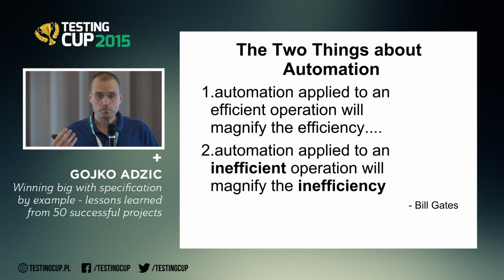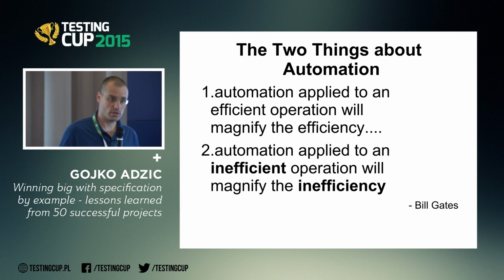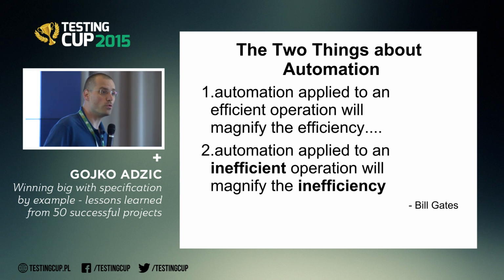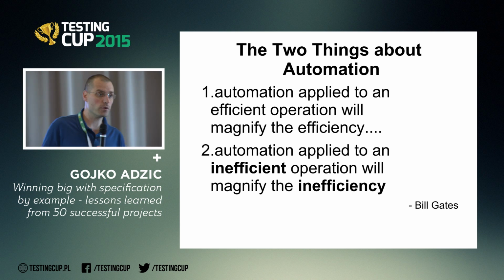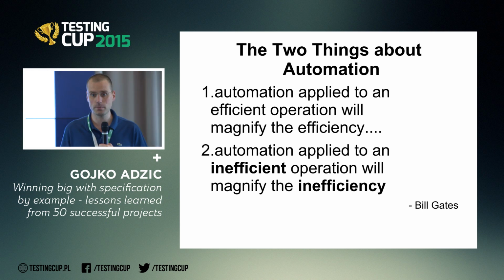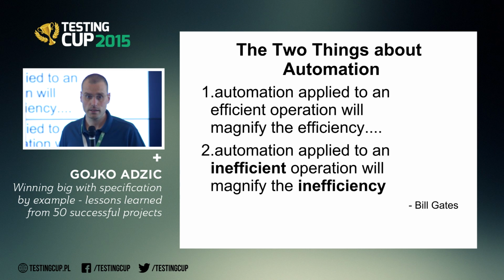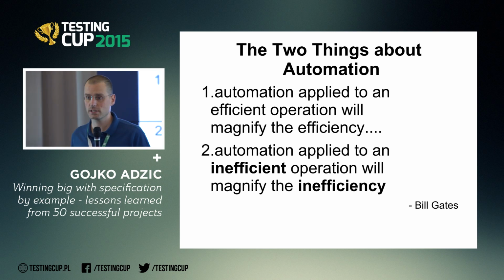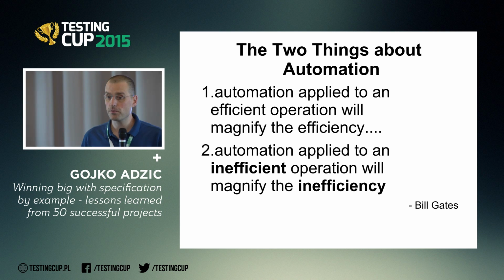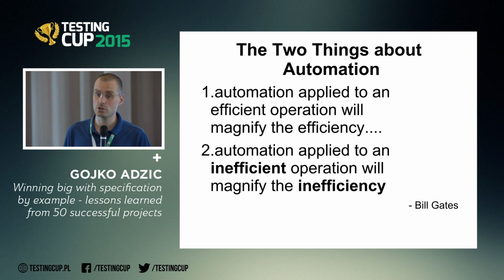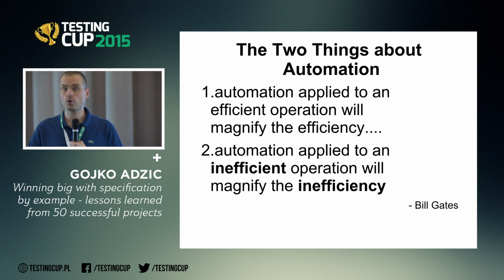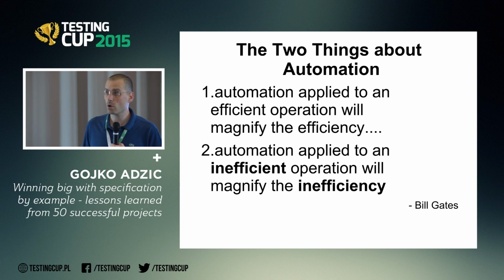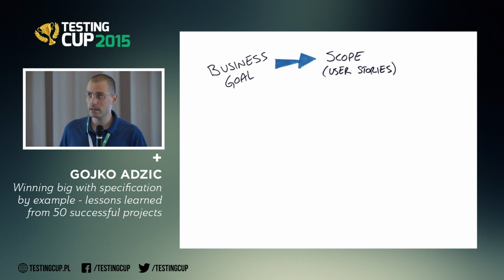So instead of doing one of those 2 options, the teams that get a lot of value out of this process actually use 2 forms of requirements. They use one form of requirement that's relatively vague but good enough for planning, that has some broad details about what we're going to do, and that's where user stories come in really, really nicely. But before those user stories actually come into an iteration, they tend to transform those user stories into a completely different form that's a lot more detailed. So generally those 2 things are done at different times.